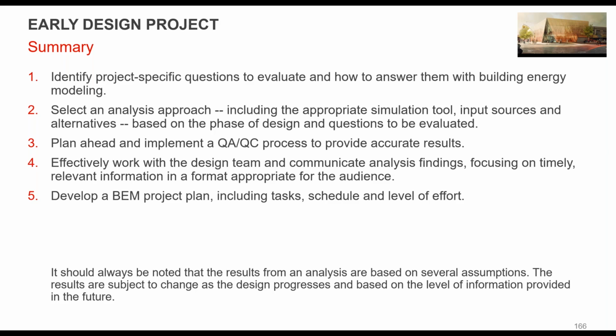And finally, develop a plan for what you're going to do for your modeling. What are the tasks, the level of effort, and the schedule, so that you know you've got X number of hours to spend on a project or this portion of the project. Everything you're doing here is based on a lot of assumptions, not just several, so be ready to change that as the design process moves forward.